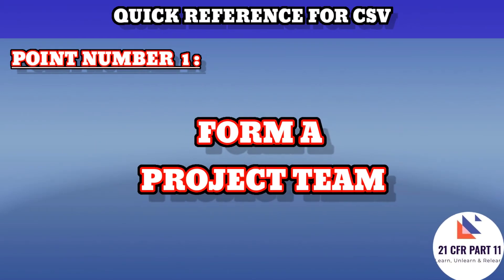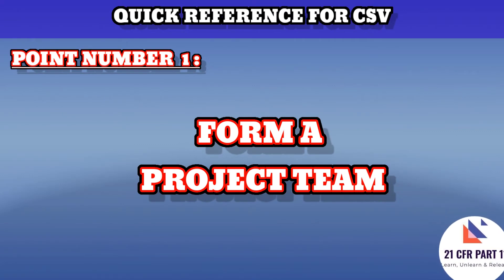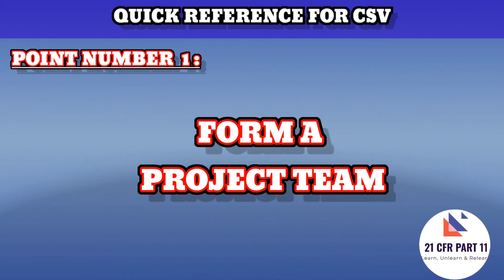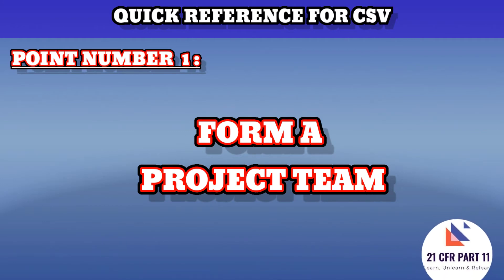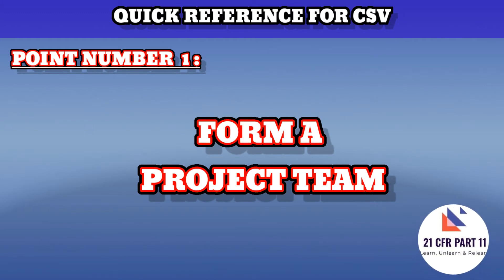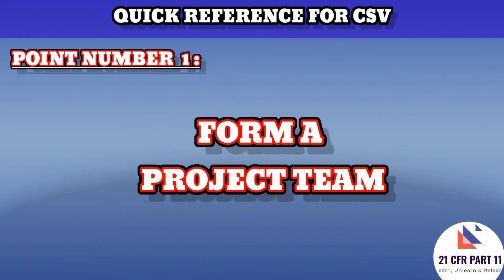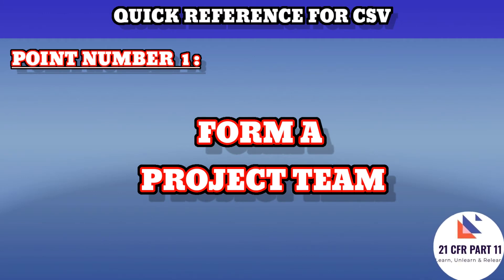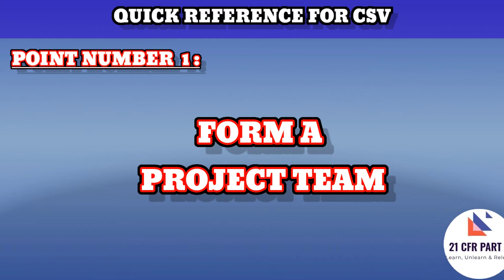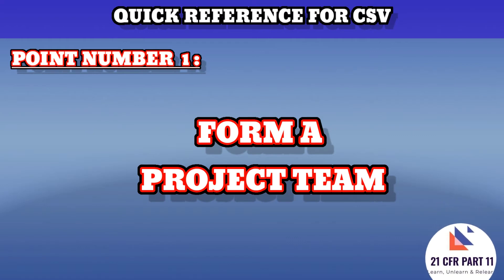Point number one says to form a project team. Representatives from key areas like IT, QA, user groups, and validation groups — if available in your company — as well as regulatory affairs, documentation, and purchasing must be included. This team should meet regularly, make all critical decisions, and communicate to the user base. One member must be defined as the validation lead, and the team must have management support.